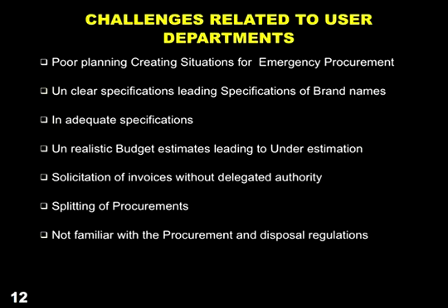Dollar rates. So what are we trying to say here? For the budget estimates that we do, we need to consult the current market and see what is there, other than just depending on the previous budgets that we have made.